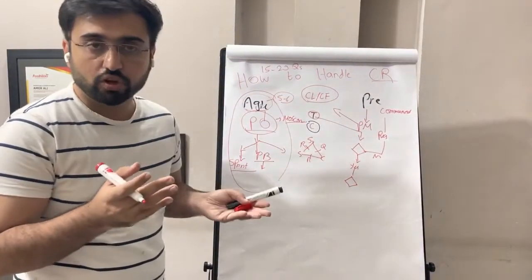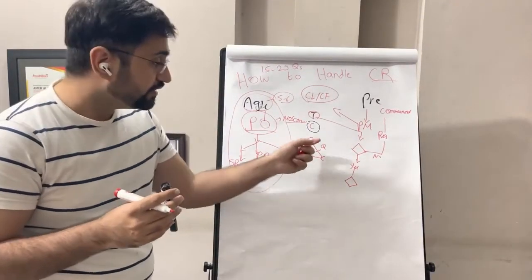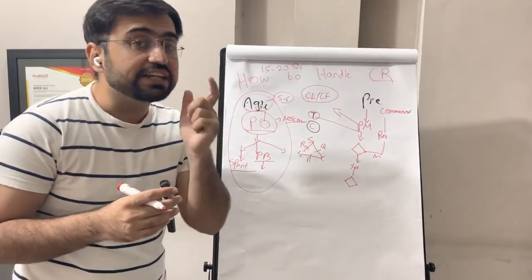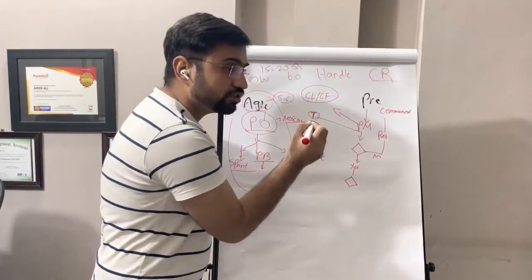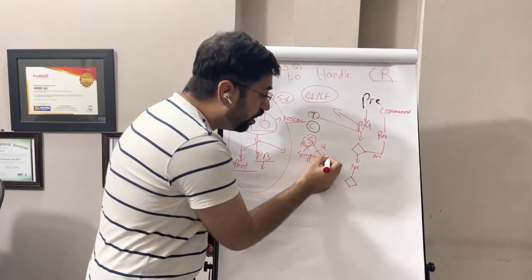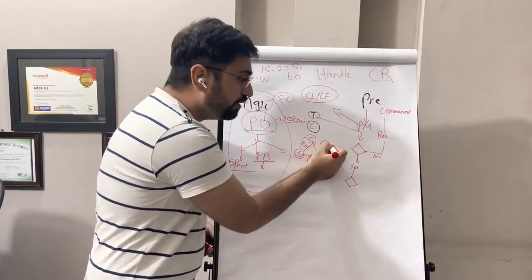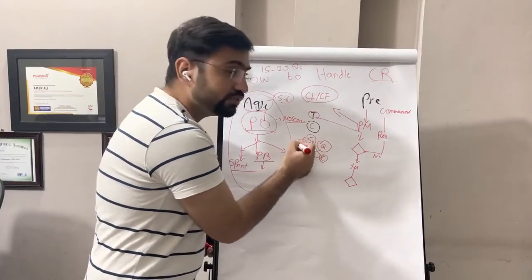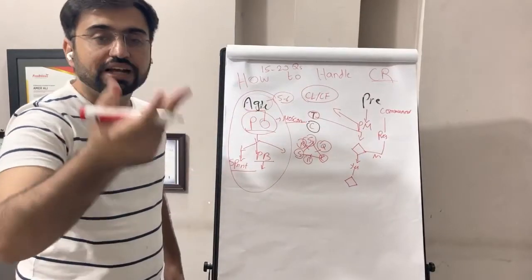Basically scope, schedule, cost, baselines and other plans, how they are affecting it. This process is called integrated change control. Integrated, we are looking: if we change the scope, how is it going to affect the cost, how is it going to affect the schedule, will the quality be affected, do we have the resources to work on it, and will the risk be affected, and things like that.